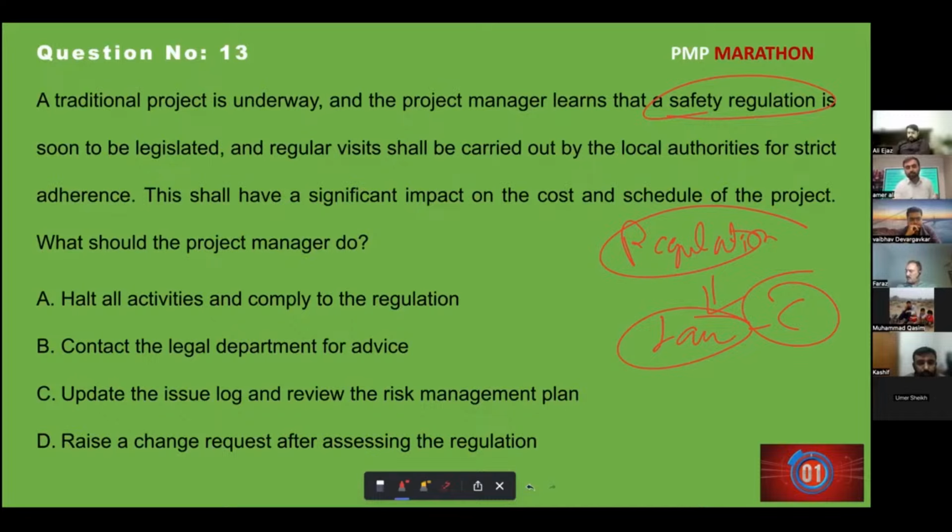What is the first thing a project manager does when something new comes? Update the project management plan. No, you cannot just update it. How do you update the project management plan? There is a way to do that. We need a change request.